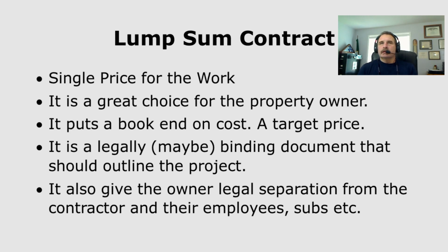What this is, is a contract worked out to a singular price for the work. Of course, there are always allowances and contingencies involved in that, but it's basically a contract that really narrows down and puts parameters on the contract. It's a great choice for the property owner. It puts a bookend on the cost within your target price, at least when you go through the design and build process. When you get through it and are ready to either go or no go, you're going to know what you're looking at. It's a legally binding document that should outline the project.